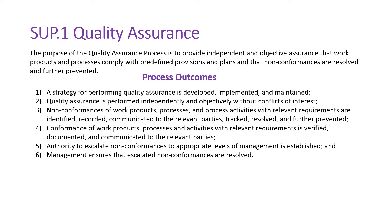It should be completely independent. Whenever you get a project or you are engaged with some work, the same requirements will be provided to the quality assurance engineer. The engineering team will understand the aspects in one way, but the quality assurance people will look into aspects like how to verify these things, how to get adherence with respect to standards, what is the acceptance criteria, and how to plan as per the SOW or the contract shared by the customer. During audit processes, we will get non-conformances, and quality assurance people will concentrate on resolution of those non-conformances as well.